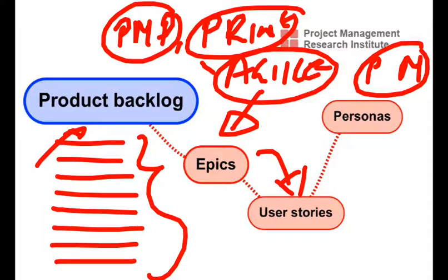Now while writing the user stories, always we have this dilemma of how deep or how elaborate these user stories must be. Initially, I also made the mistake of writing the user stories to the screenshot level, and sometimes giving the table structures, which is actually wrong. User stories, again, are at a high level. To write better user stories, always think about the personalities who are using the system. As a user, what are the things I'll be doing? As a system administrator, as a super user, as a manager, what are the things I'll be doing?